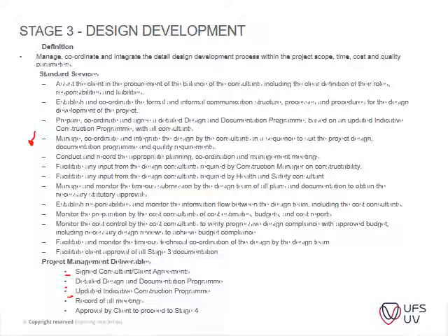But you will not go into details of, okay, now we're doing the strip footing, and now you have to wait 7 days, and now you have to pour the concrete and build up your foundation walls, etc. It still is divided into elements and not really items as such. Okay, and then again you have to record all of your meetings, and then you get approval to proceed to stage 4 again. So usually at the end of stage 3 an elemental estimate is produced, so that the client can take a final decision.